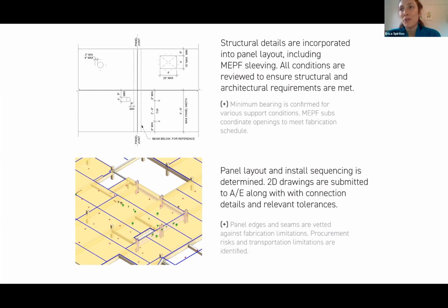I would call it even a 4th phase of design. It goes beyond what we usually develop in the construction documents process, and this phase typically takes place in parallel to the construction documents phase. So it's almost like you're doing construction administration while you're doing construction documents, if that makes sense. Really answering a lot of those questions about precise locations and sizing.